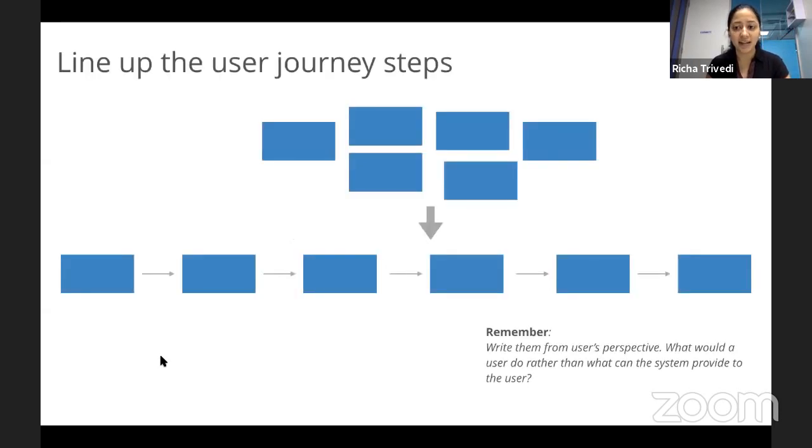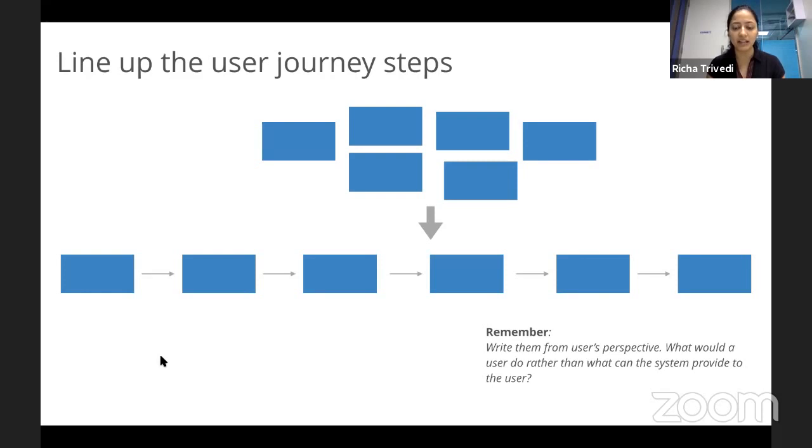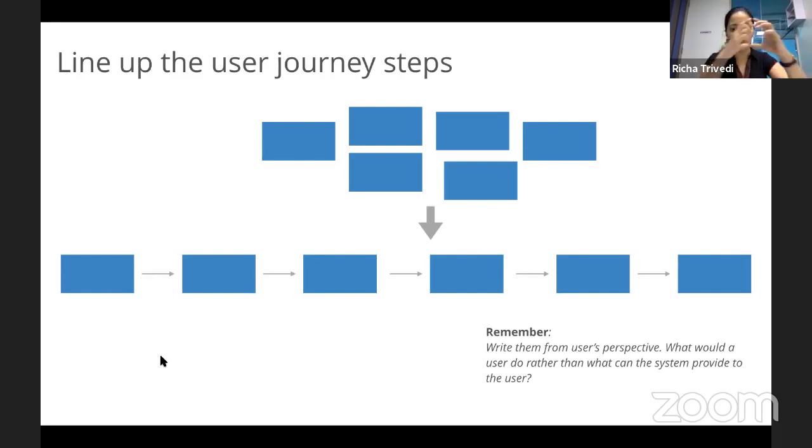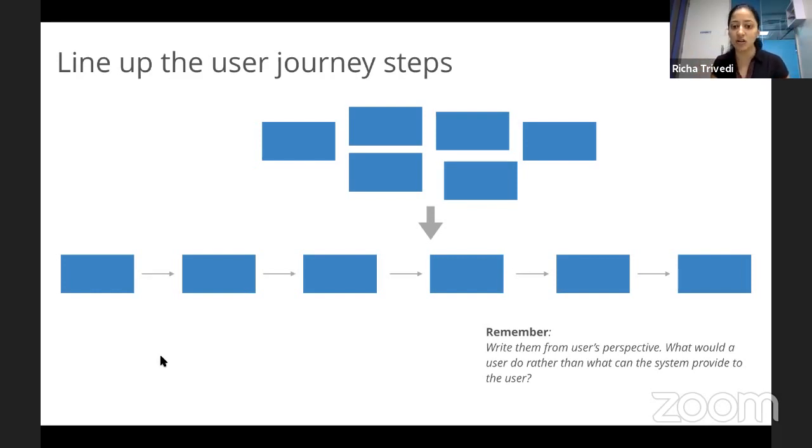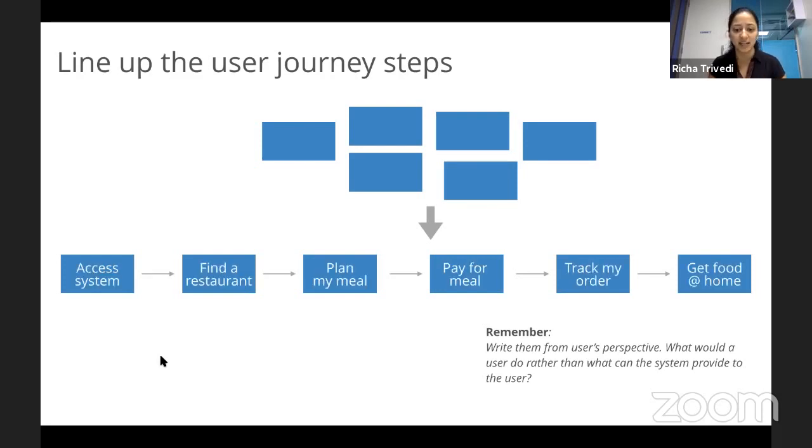So the first step is, in an existing project, you might have features. Not a problem. You can just align the features in a sequential manner. Or if you already are on a new project and you've done the user journey well, then just highlight the high user journey steps. Put them into a sequential order. Just remember that if your features are not already from a user perspective, please change the language to a user perspective rather than talking system language.